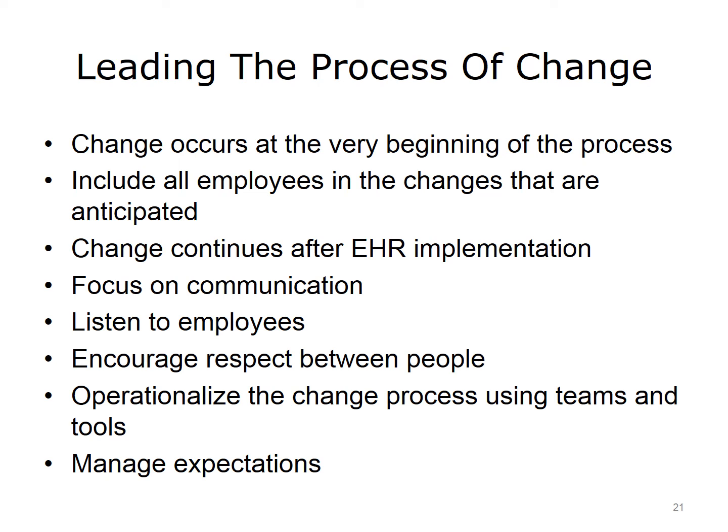In planning for change management, it can be helpful to review the culture of the organization during past significant changes. This will help identify the types of communication and learning environments that have worked in the past and identify the methods that were less successful. A strong commitment to communicating with personnel during all stages of EHR selection and implementation cannot be overemphasized.